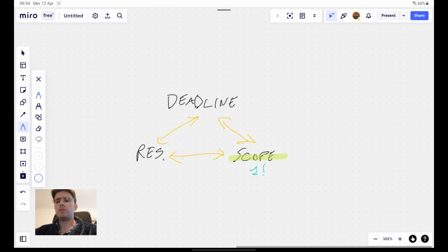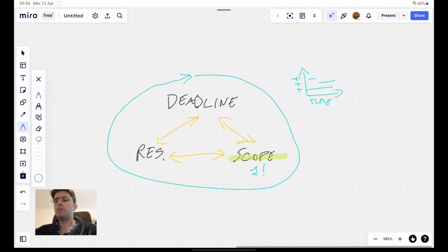This negotiation takes sometimes the form of the Gantt chart we saw in the previous episode, where we link all the tasks we need and put them in a timetable. Then we use that information to understand the number of resources needed. Rinse and repeat a couple of times, and because most of the tasks are simple, we know how long and costly they are, and so we can be pretty accurate with our plan.